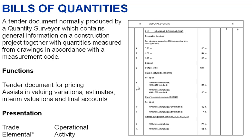If we look here on the right hand side, we'll see an example of a Bill of Quantities. This one relates to a civil project. We'll see that there's drainage below ground, excavation of trenches, and descriptions for pipes not exceeding 200mm nominal size with average depths stated in the classifications as per the method of measurement being used. We also see the quantities, the units of measurement, and then there's an area for pricing.